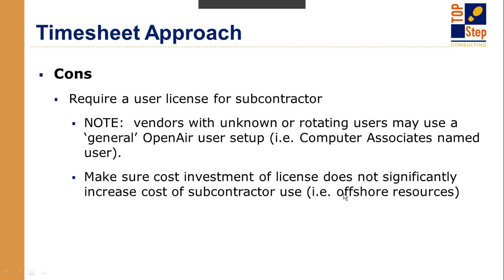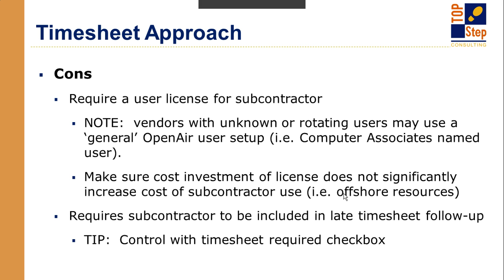It requires the subcontractor to be included in the late timesheet emails, which isn't necessarily what you want. You can control that with the timesheet required checkbox, however. You can basically make these folks so they are not timesheet required, and then they can opt out of those late timesheet follow-up emails.